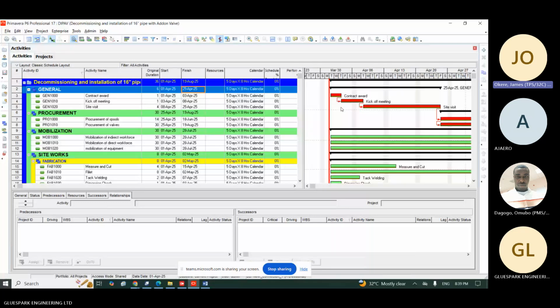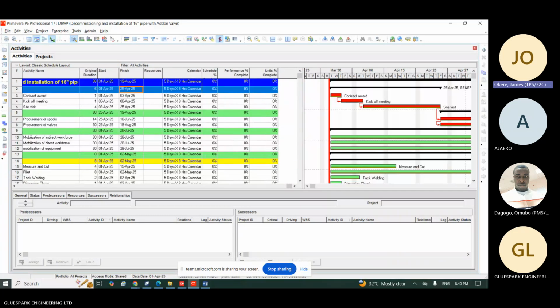The duration will now extend to cover the linking. The linking will make your activity split to indicate when they are going to happen, right? And this will give you the exact duration of the particular project. Now, this one has changed to 15, and the finish date of this one has also changed to 19th August 2025. When we are done with it, you find out that for the whole project we cannot yet determine when it's going to finish. I just want us to know the effect.